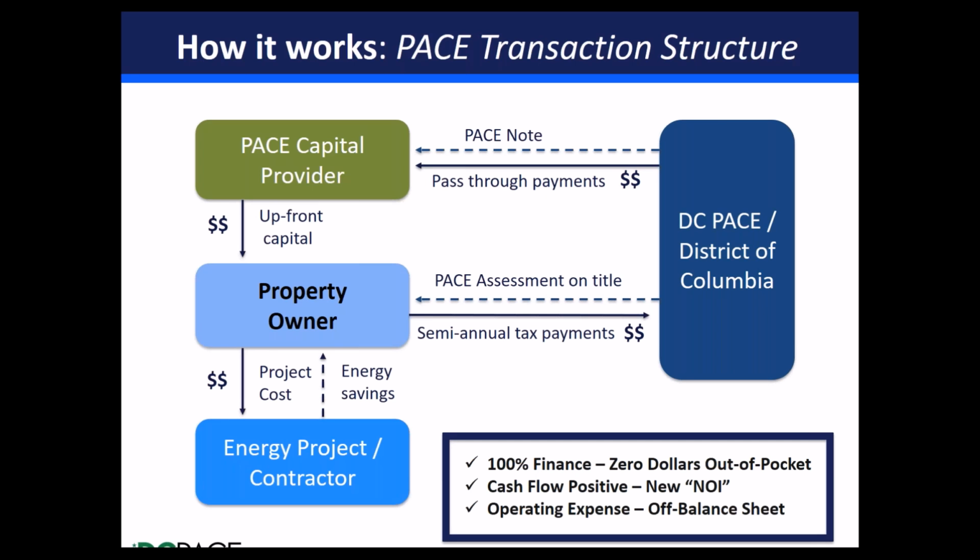So it's not a capital budget line item, and this is going to be really important. I think Wayne mentioned the notion of value engineering earlier on. Often what we see, especially in capital constrained projects, is folks don't have the money to build the building they want. So they end up having to cut back. I'm $1 million short. I'm going to have to cut $1 million out of my capital costs. So solar, even if it yields long-term cash flows, it goes because it's not essential. So that 100% financing is critical.